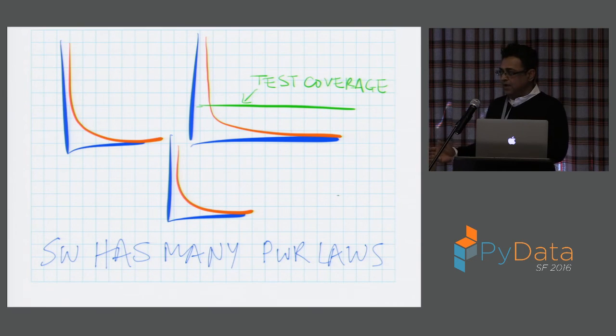And then stuff to the right is where we are wasting effort. One of the surprising things that came out for me was that if you start by focusing, using these numeric measures, on the area where the biggest risk lies, your effective coverage of actual risk would be better than simply looking at lines of code and files.